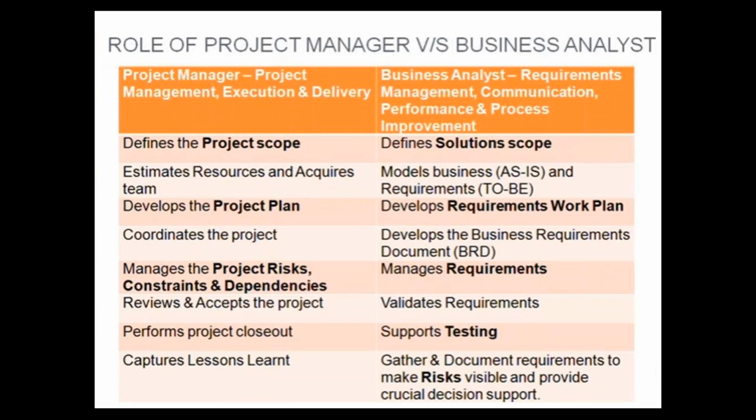In a software company, if you're working for an external stakeholder, a delay of about 1 week in the accepted delivery date will lead to 2% deduction from the total amount. So a project manager has to be very, very careful. If there is a delay of about 1 week, a 1% or 2% deduction of the total amount accepted for the software development will be made, which is a loss to your company.